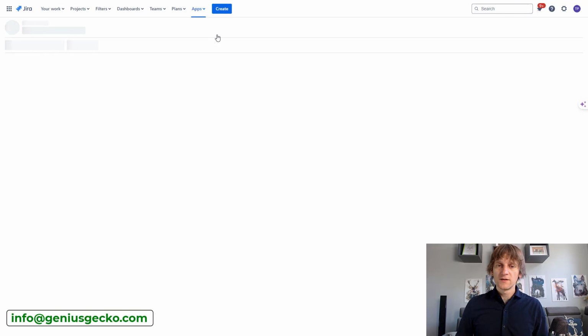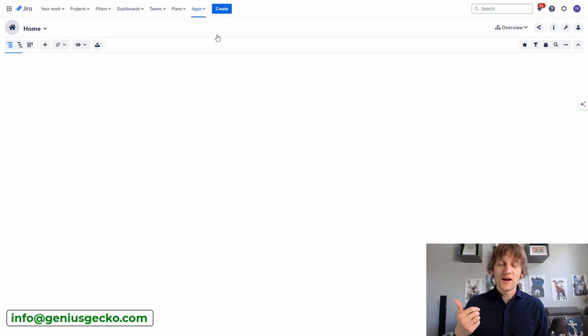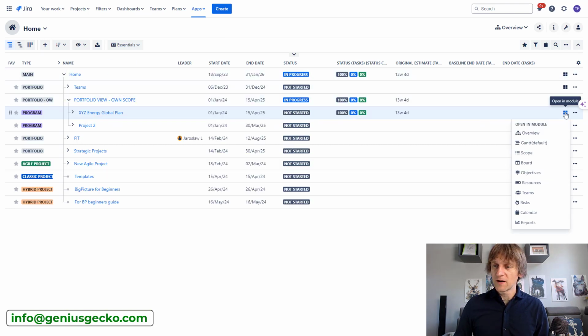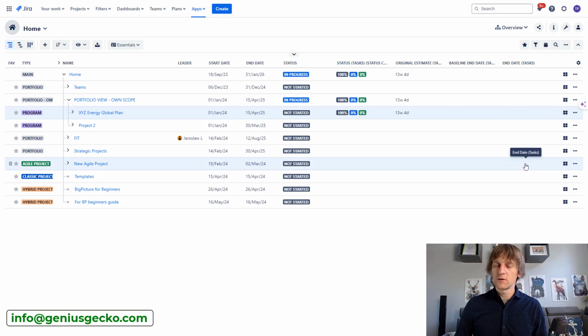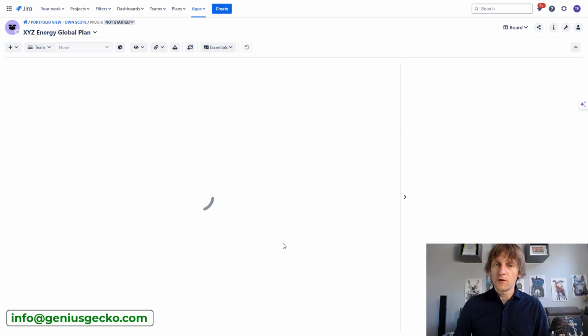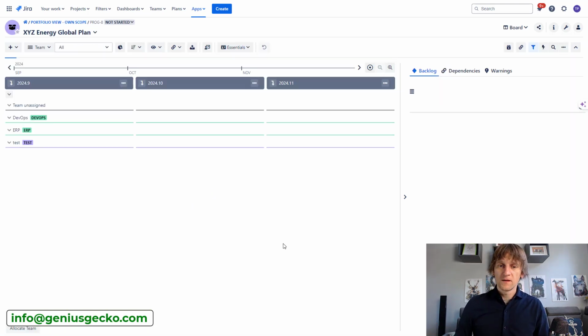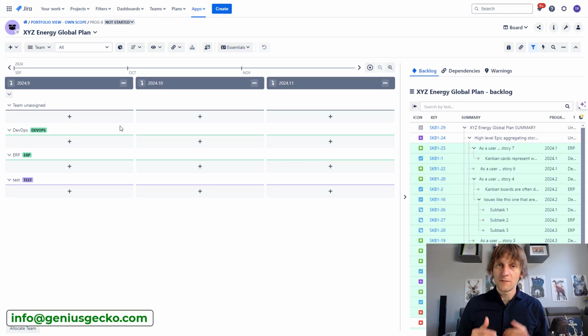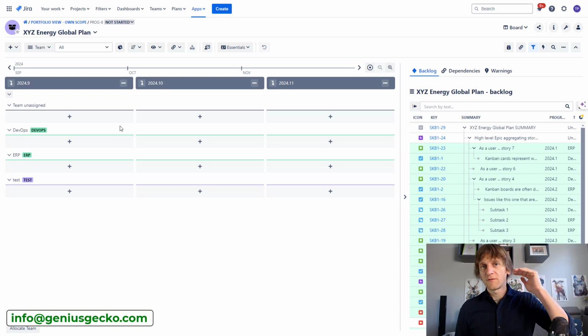So I already mentioned the board module, and I'm going to visit it in a moment when it loads. And the board module allows you to do the planning, and execution of course as well later on, from the perspective of the Agile approach. So that means that you divide your project into some smaller elements in terms of time. So usually these are sprints. Sometimes you have something in between. So you can have program increments and sprints underneath this.